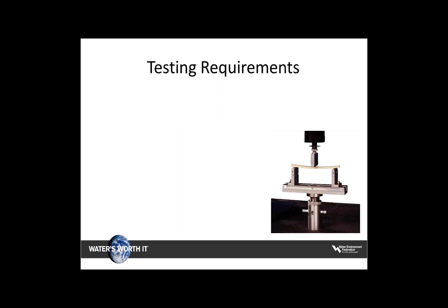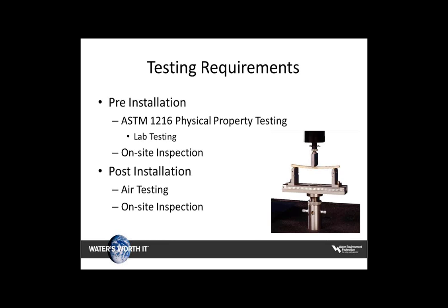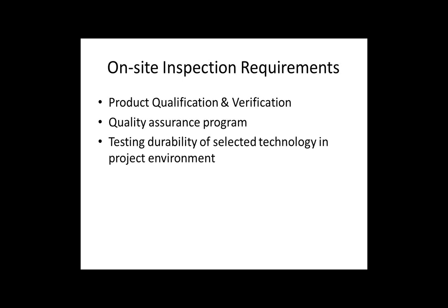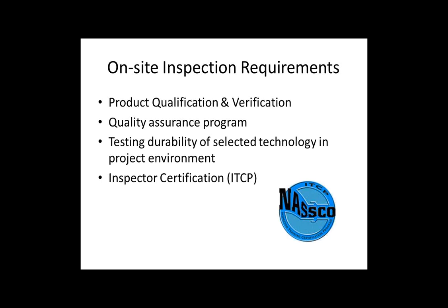Testing requirements are laid down by the standards and include lab testing as well as field testing, with similar requirements for post-installation where you can perform air testing and dye testing. It is important that a product or technology being used on-site has been qualified and verified by the manufacturer and by a third party. A quality assurance program should be in place on the project site. The inspector should have testing data of the selected technology in a similar project environment, and the inspector himself should be trained and certified by a program such as the Inspector Certification and Training Program by NASCO.